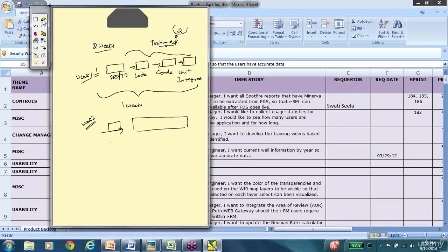And sometimes this works. Sometimes what happens is the QA will test here. The process of testing is the same. We know what the requirements are, we identify how to test, and then we perform the actual testing itself, the dynamic testing part. So this is one way. In this case, the QA team members work on more than one project. So while this project is in the development phase, we will be performing the QA for a different sprint or a different project. So this is how you can keep the QA team engaged.